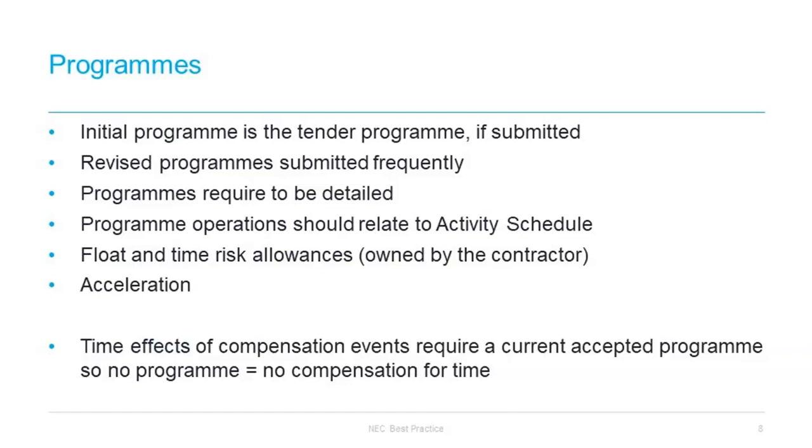And if your programme or programmes should have been accepted, then the second question to put to the adjudicator would be, secondly, what is the impact on all of these other compensation events that have been wrongly assessed because there was an inadequate or old accepted programme?